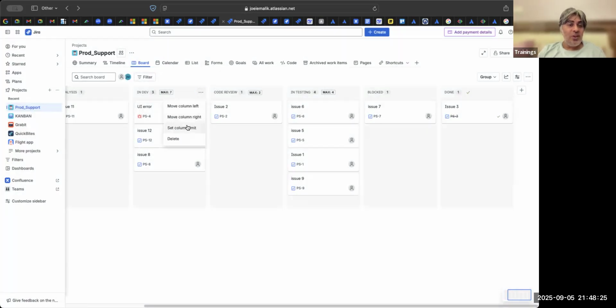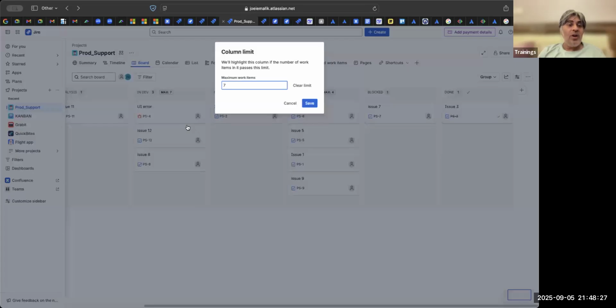Because remember, this developer now can have 1 testing item, but 2 development items. The code reviewer can handle 1 ticket. The guy who is helping Sudipta with testing can do 2 tickets instead of 3. So 1 plus 2 is 3, 3 plus 3. The one other developer can do all 3. So this is 6.